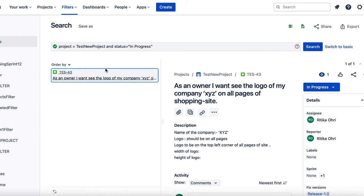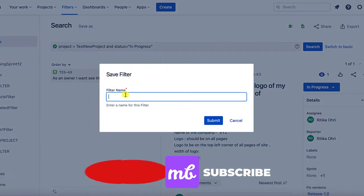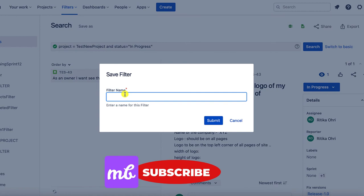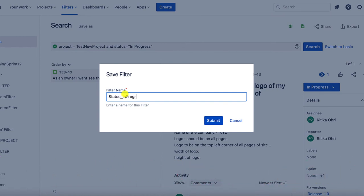It won't be created until and unless I go ahead and do a save as. Give the filter name. I am giving it as status in progress issues and submit it.